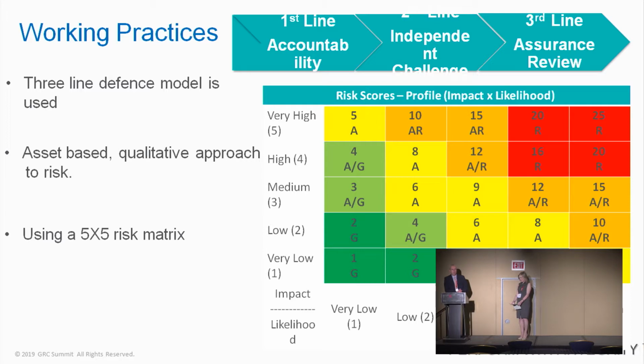And what's happened is that the risk owner was the same person charged with the remediation. Nobody was holding them to account, and those that were most impacted by the risks didn't have the visibility of the risk. So there was a conflict. They own the risk and are responsible for the remediation with nobody holding them to account. So again, that's something we've had to address and move across so that those most impacted had full sight, full visibility of what it was that could affect their business.